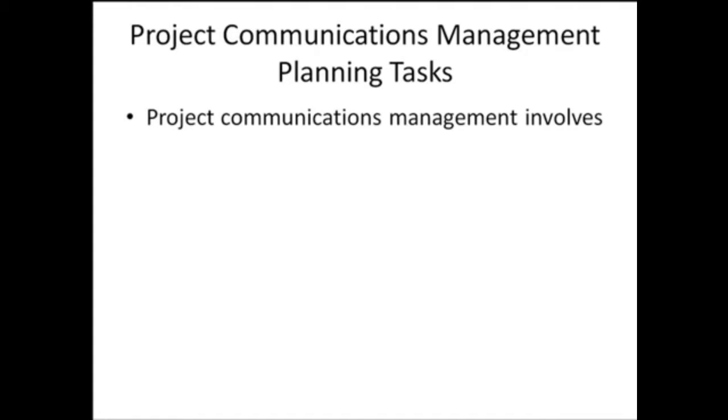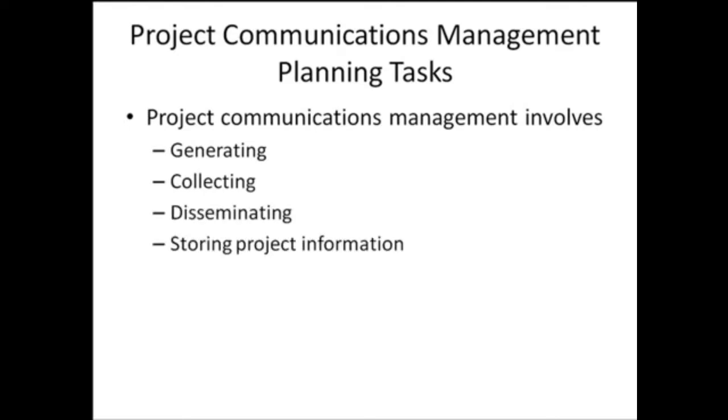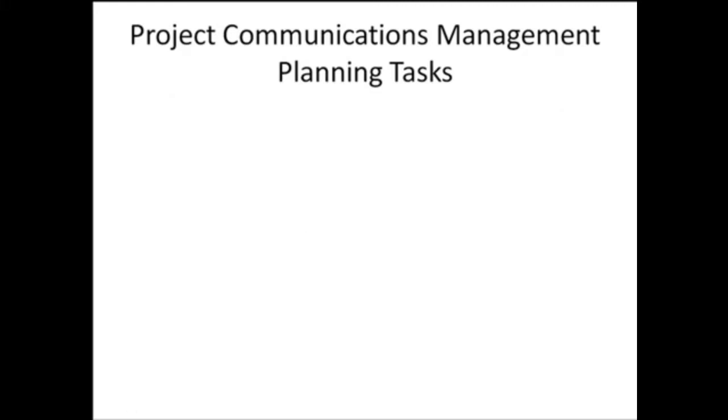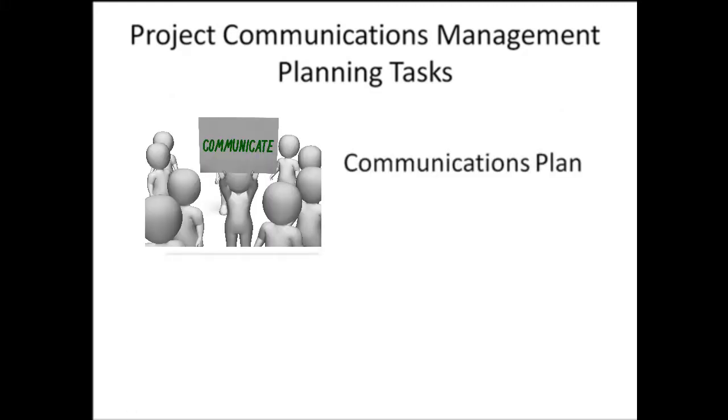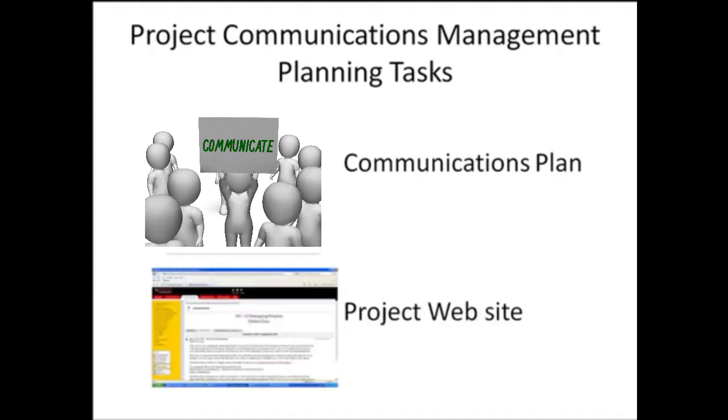Project communications management involves generating, collecting, disseminating, and storing project information. Because project information is so important, every project should include a communication management plan, a document that guides project communications. Key outputs include a communications plan and a project website. All large projects should include a website.